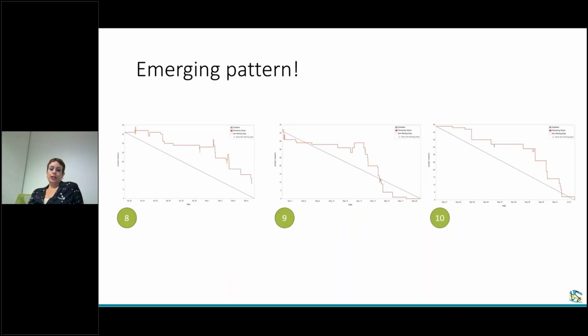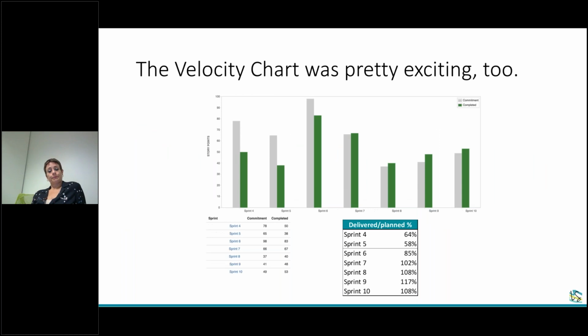On the burn down charts here, that can actually go either by count, by hours, or by story points. So if you're really just starting out and you maybe don't have story points on everything, you can also do burn downs based on issue count. So literally, as a thing is closed, it burns down the chart. The velocity chart doesn't give you that flexibility. So if you have to put hours estimates on your Jira tickets for whatever reason, then it can actually be configured to burn down by hours. So you've got hours count and story point on these guys, and then you have story points on this guy. But yes, data quality. You have to have the data in there, and you have to move stuff.